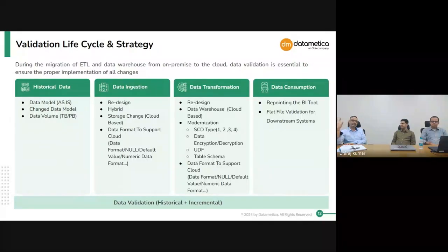So with all this challenge, how can we have a phased approach to modernization? Try to get to the new platform, adopt the new technology, keep the data model similar, and then as a phase two, try to tweak the data model to get even better throughput and efficiency from the new platform. That's something we have learned by doing so many large-scale migrations, because the moment you start taking on a lot of challenges, it becomes a never-ending effort.